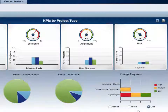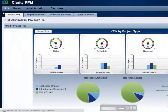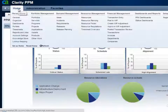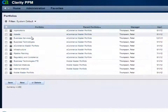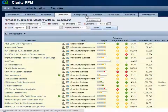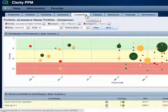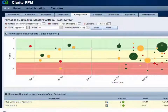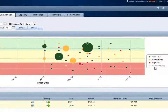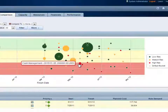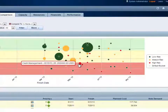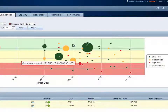Using this, we can ensure the proper portfolio mix is being maintained and balance risk across the portfolio. We can perform scenario analysis across the portfolio to optimize the set of projects in the portfolio. This diagram shows projects over time grouped by their priority. The color of the project represents risk, and the size of the bubble is the planned cost. Cash management with a significant investment of $200,000 and high risk should not be invested in before higher priority projects. Through scenario analysis, we can select the optimal set of project investments taking into consideration risk, cost, and priority.